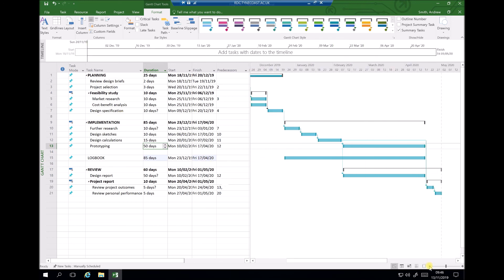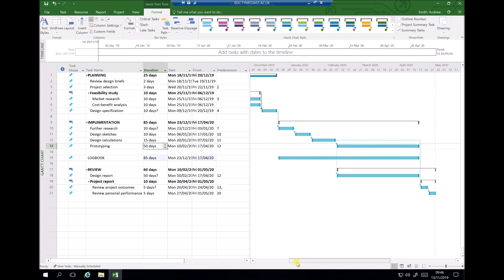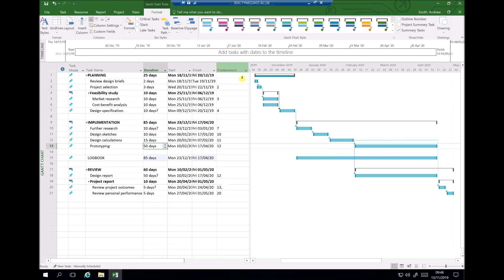One activity that stands out is the prototyping stage, which was outsourced and takes ten weeks. During the further research stage, we could identify alternative companies that could complete that in shorter timescales. Minimizing the scale on the right-hand side lets us see the full project lifecycle — tasks running concurrently such as prototyping, writing the report, logbook and implementation, as well as tasks that run end-to-end. This demonstrates how Microsoft Project can be used to manage the life cycle of your project.